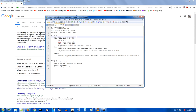Now let's be clear on something: a user story isn't just the first sentence in it, it's the whole deal - the whole package. Usually user stories have acceptance criteria. So even if I write the initial statement in a relatively vague way, the acceptance criteria might be where all the nitty-gritty details, such as placement of buttons, will be.